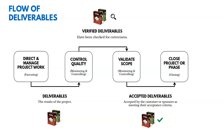In this knowledge area, we're also going to be validating scope. Validating scope means taking deliverables we've checked for quality as a team and getting acceptance from the customer. Verified deliverables — those we've checked for correctness — are an input to this process. The output, hopefully, is accepted deliverables: deliverables accepted by the customer or sponsor as meeting their acceptance criteria.